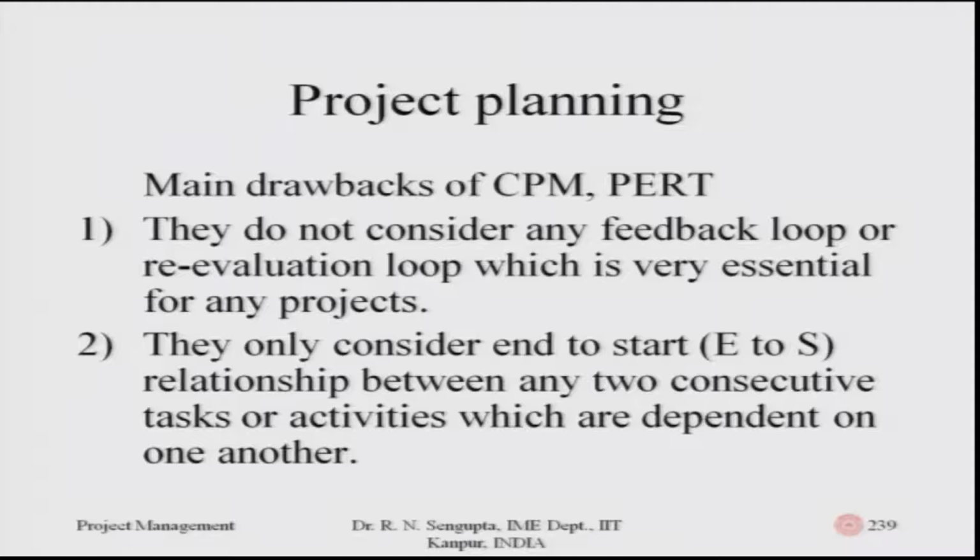The main drawbacks of the critical path method and the project evaluation review technique are that they do not consider any feedback loops, which I mentioned in the beginning of the course, and we will consider this concept for GERT and Q-GERT concepts. Hence feedback loops or re-evaluation loops, which are very essential for any projects, are not there under CPM and PERT. They only consider end to start. So this concept I will come to within a few slides.